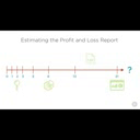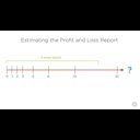And, Alan adds, we'll try to only add items to the sprint that we're confident we can deliver in a 2-week period. Since the tax deduction report took several weeks to complete, we know that we're unlikely to complete a 21-point product backlog item in a single 2-week sprint. This means that any 21-point item would need to be broken down into smaller items before we'd consider adding it to the sprint. To start, we'll only add items 13 points or smaller into our sprint.